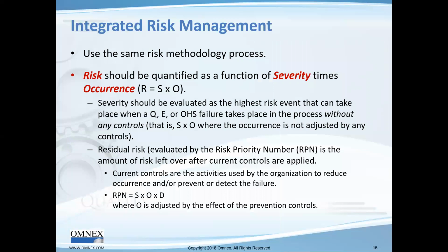And when we talk about risks, there are various ways people define risk. The basic is severity times occurrence. What is the impact level versus what is the probability of occurrence? However, there is also the residual risk. Residual risk has to be defined because one aspect of my risk assessment is that if I now put into place methods to minimize the risk, what is the residual risk? And is that residual risk sufficiently low that I can live with it?